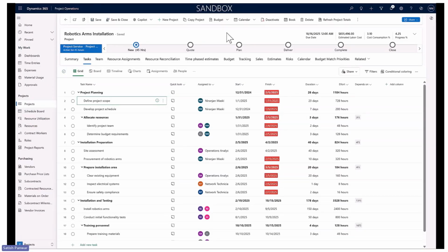Let us look at another aspect where one would need a revision and update of a project budget. Suppose there is a change of plan. Let me take the same task, different project scope. Earlier it was planned from 1/1 to 1/1. Now because of some reason, I might have to update the plan to end by 1/31. Sounds familiar? This is how generally the projects would work. Whenever there is a change in the task or the schedule or any needs of a particular project, you'll come and update the plans.